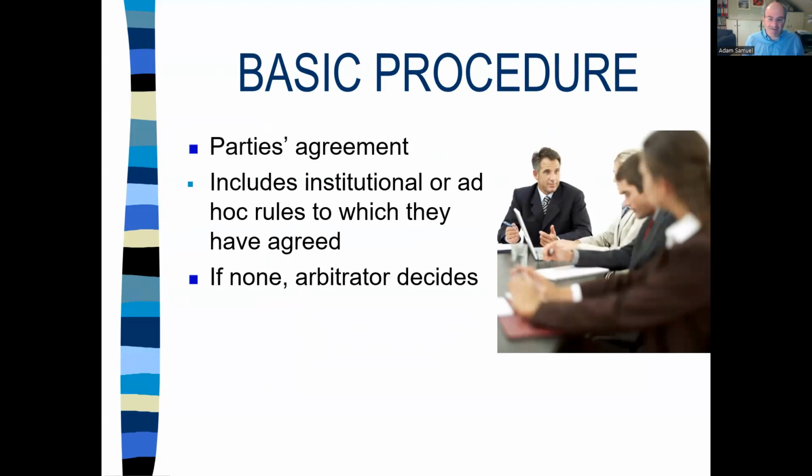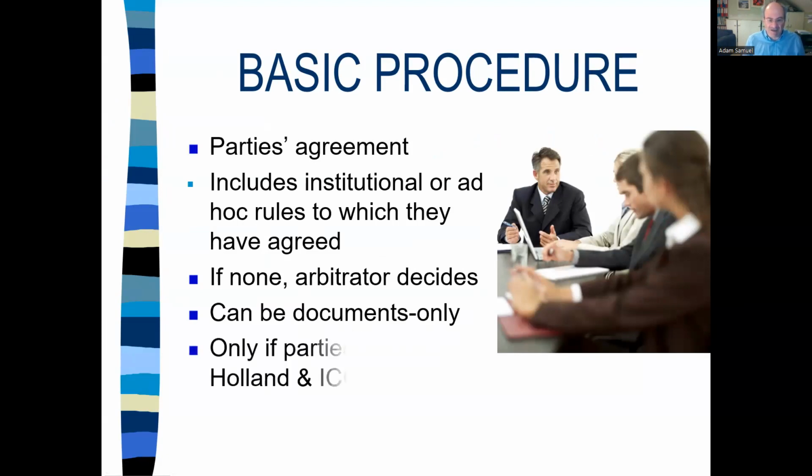If the parties can't agree, the arbitrator makes the decision. You could end up going down a documents-only route, but be careful because Dutch law and the ICC rules require some sort of agreement. However, if you do hold a hearing, you can't hear everything. You can't allow the parties to take years churning out witness after witness after witness. There has to be some sort of control.